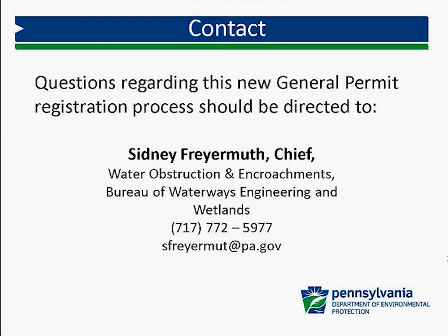Does the County Conservation District approval of the E&S plan need to be obtained prior to submission of the GP? No. Can the E&S plan review be completed concurrently or after the GP authorization? Yes.